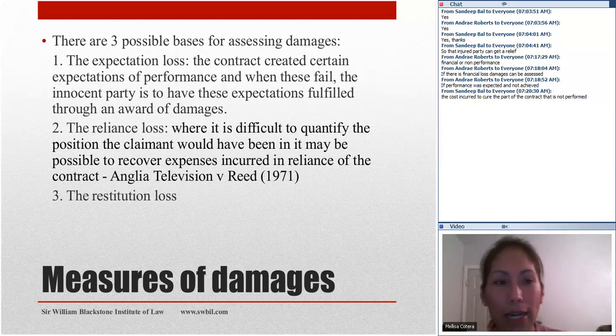Okay, so here the plaintiff paid £177,500 for the house, no? The value of the house in its actual condition was £162,500. So there is a difference of £15,000. The actual cost of repairs was £34,000. So if we follow what the trial judge said, if the plaintiff were to end up with a house and an award of £34,000 damages, he would have obtained the house for £143,500.